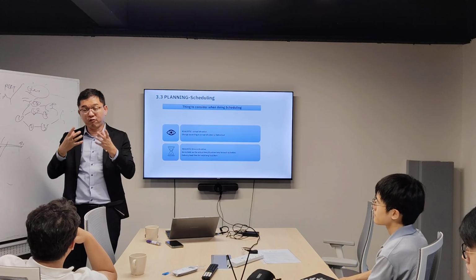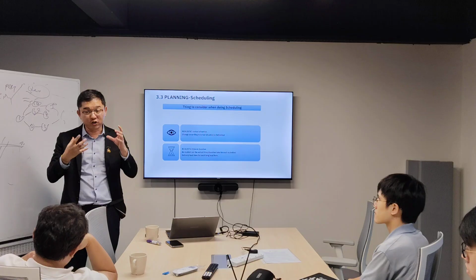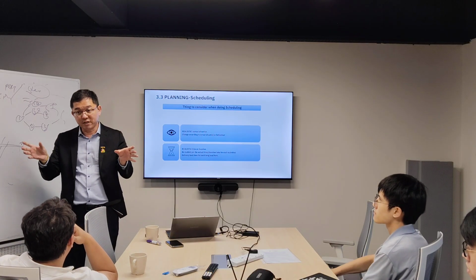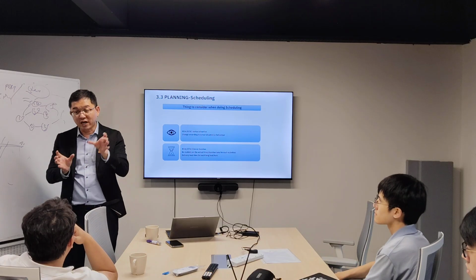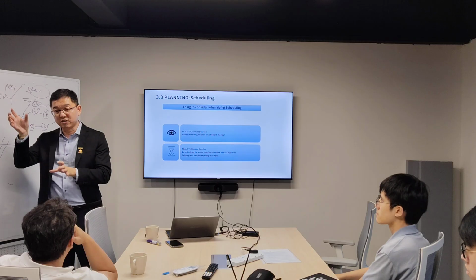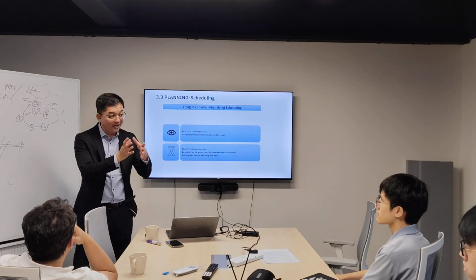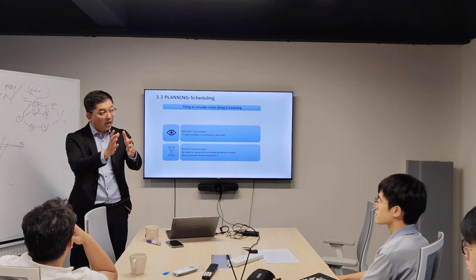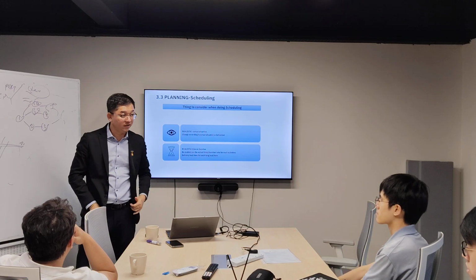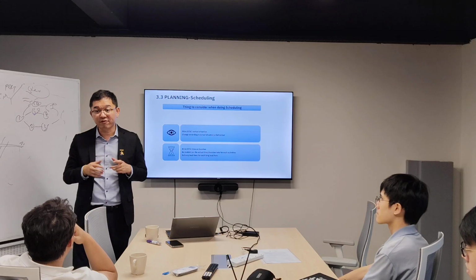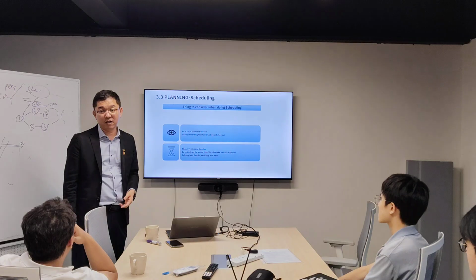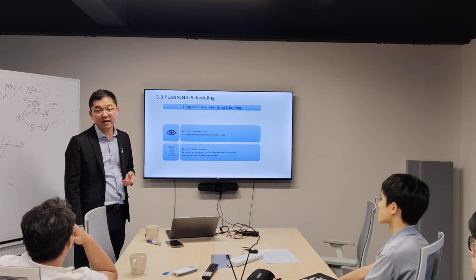That's why the excavation for the volume of the earth for project A and project B, at a different time, you cannot put at the same duration. You need to consider the timing, whether your project A is, let's say, awarded or started during the rainy season, you need to allocate more buffer of duration. That's why you need to understand the timing or others. Okay?